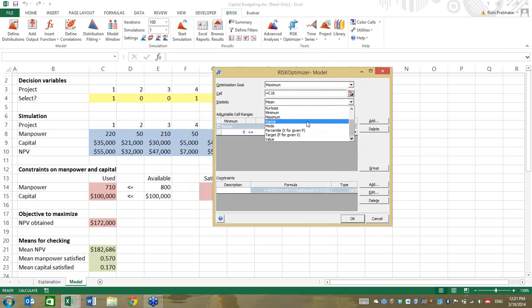Working on the range, so again another issue around volatility. Or, and this is more likely to appeal to people in a risk analysis environment, optimizing a percentile or a particular target value. So for example, you might ask what portfolio of projects or investments minimizes the probability of a loss or maximizes the probability of us making more than $10 million and so forth.